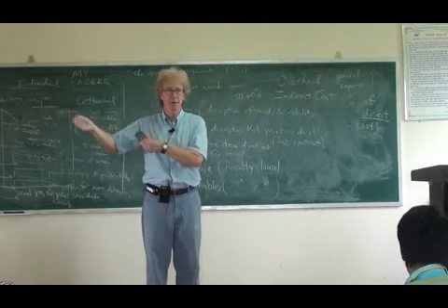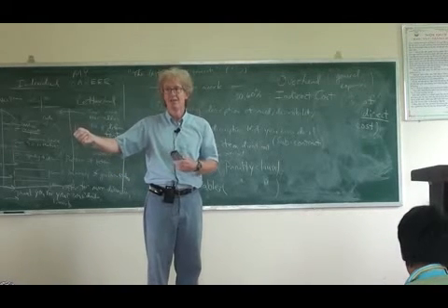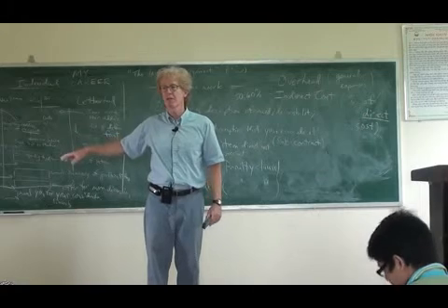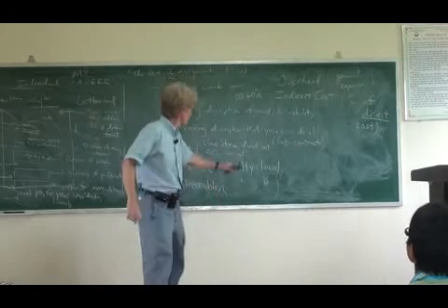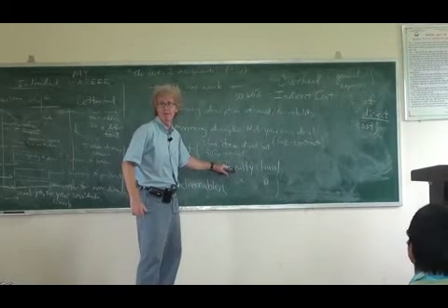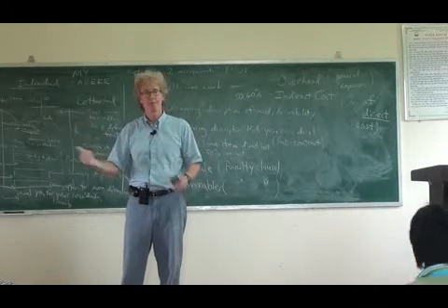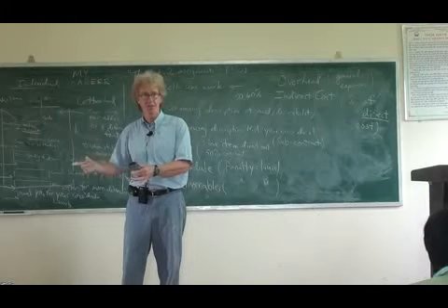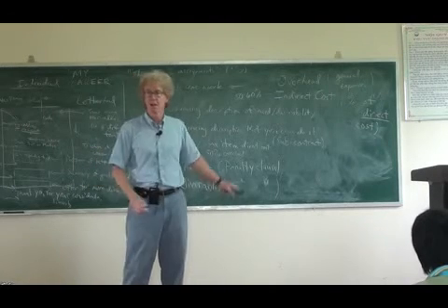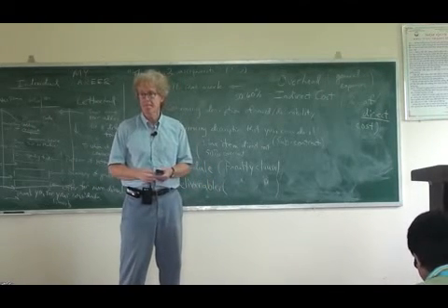You're going to have a subcontract with Rector Fan so that you can come use the machine for 1 week and you have to pay him something. That's another line item in there. And when you use the machine, maybe you have to go to the store and buy some equipment for the machine because the machine itself isn't enough. It also needs some supplies. It's another line item. Okay?